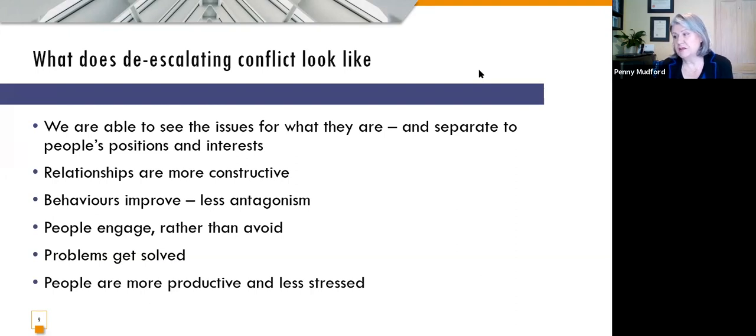Because failing to do that, if you've got tired, stressed people, if you've got deadlines that are failing, if performance is slipping, really that's establishing a situation that is ripe for dispute and ripe for triggering the requirements under a project or a contract to end up going down the capital D dispute pathway.